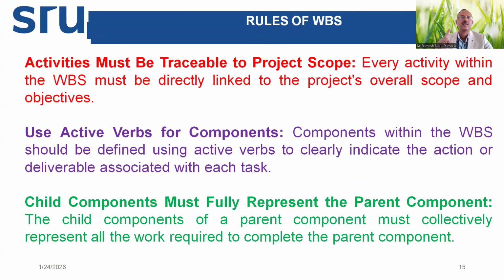First one is every activity must be traceable to the project scope. There should not be any element which is beyond the scope of our work. Suppose a project is making a multi-storied complex of 20 cinema theaters in one complex. There is a piece of land, there is a borewell available. The project scope is defined with the making of the several floors, building and electrical mechanical systems. But borewell digging is not included in this project work. So one should not simply assume that borewell and put it there. Already it was there and it was not asked for. It is not in the boundary of our project work given. Clear? It is an exclusion list, in fact.